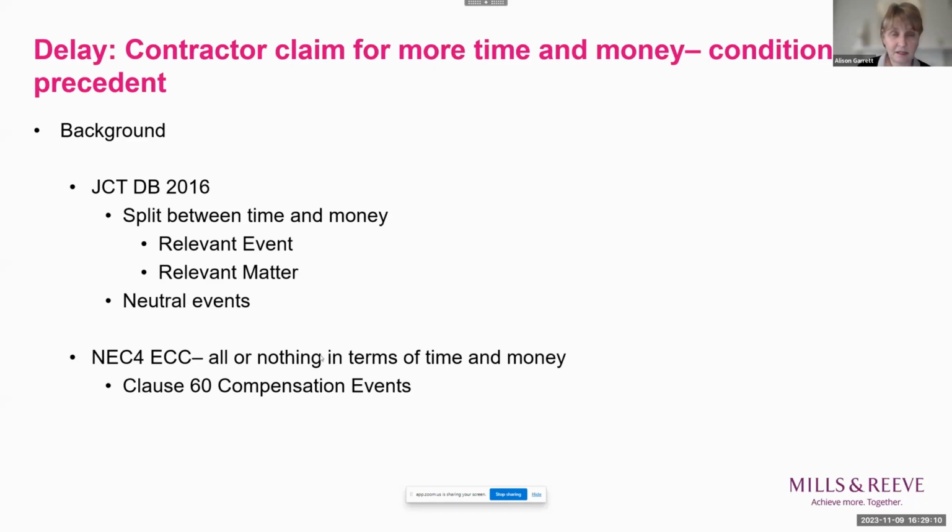NEC4, and indeed NEC3 as well, ECC, provide for an all or nothing situation in terms of time and money. You either get both or you get neither. And they're dealt with at clause 60, compensation events. Next slide, please.